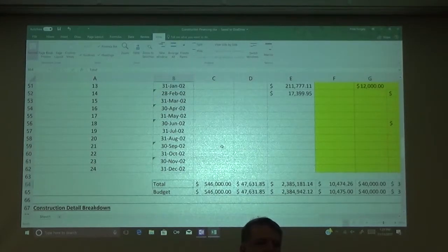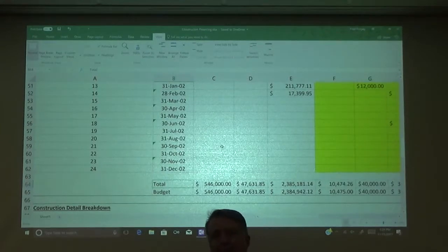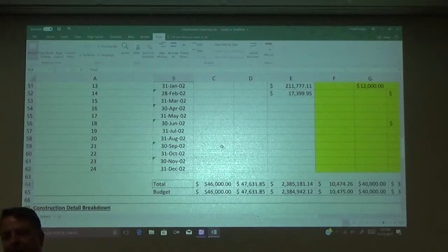There's not a lot of plumbing, not a lot of electrical, not a lot of anything other than concrete. The contingency with a project like this might just simply be delays brought on by rain, where the workers can't get out there or can't work in the mud, and that would be a normal contingency for a project like this. The lender might set that, correct?